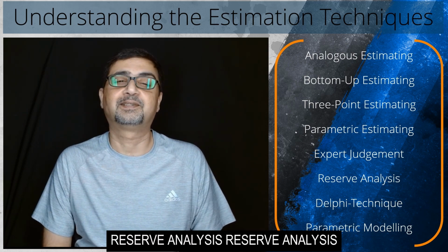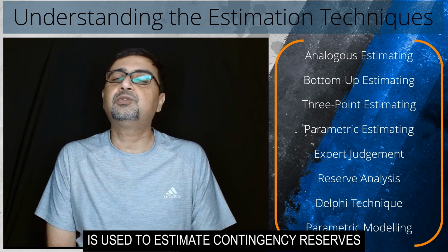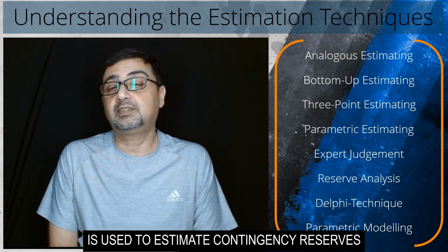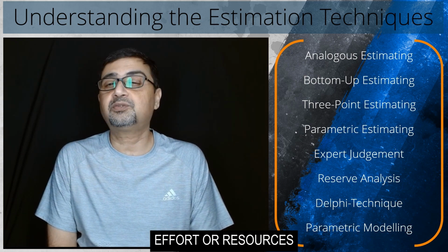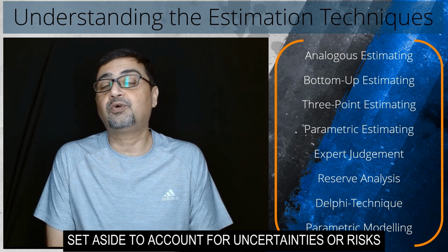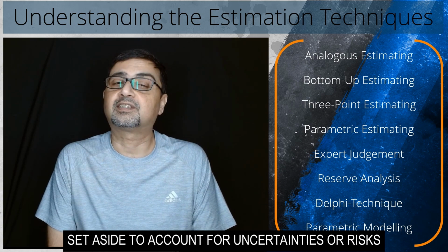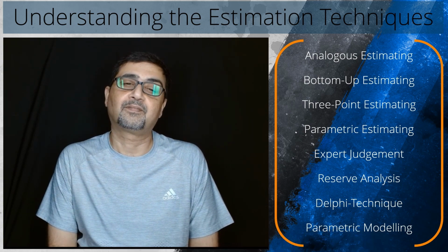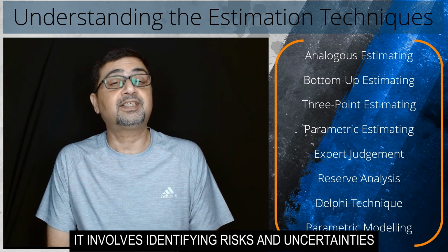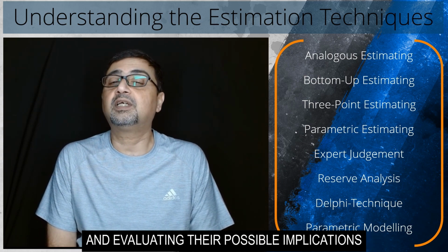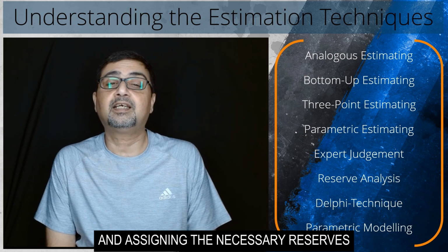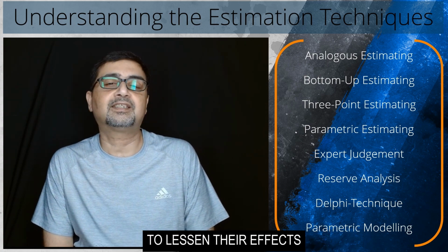Reserve analysis. Reserve analysis is used to estimate contingency reserves, which are additional time, effort, or resources set aside to account for uncertainties or risks in the project. It involves identifying risks and uncertainties, evaluating their possible implications, and assigning the necessary reserves to lessen their effects.